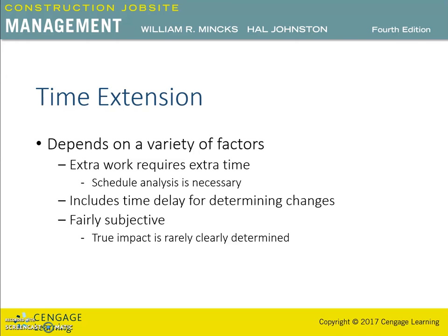Delay to the project due to unusual weather often is compensated by a time extension. Comparison of the average weather conditions to the actual weather conditions is made to determine the appropriate time extension. The severity of the weather also is examined.